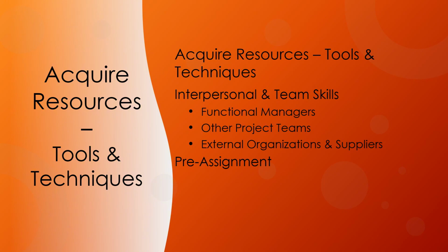When physical or team resources for a project are determined in advance, they are considered pre-assigned. This situation can occur if the project is the result of specific resources being identified as part of a competitive proposal, or if the project is dependent upon the expertise of particular persons. Pre-assignment might also include the team members who have already been assigned in the develop project charter process or other processes before the initial resource management plan has been completed.